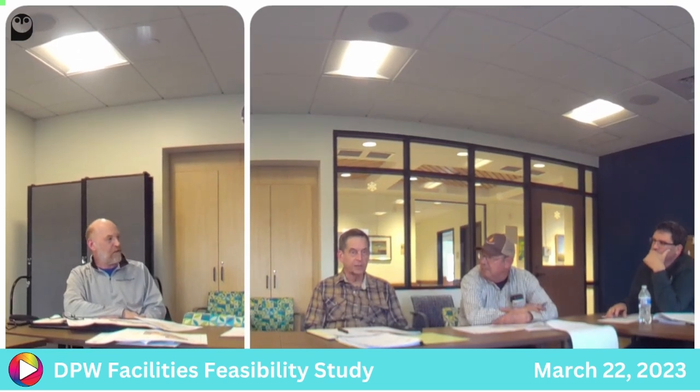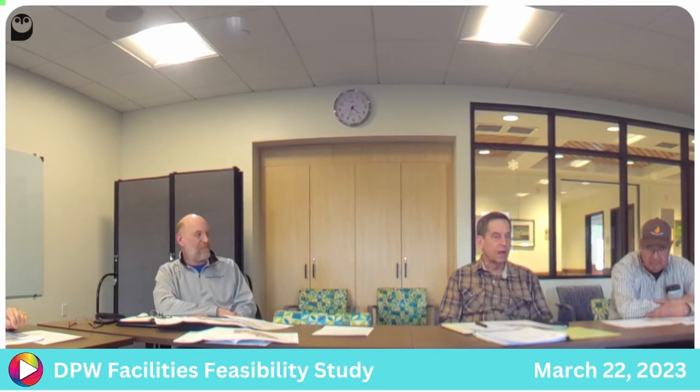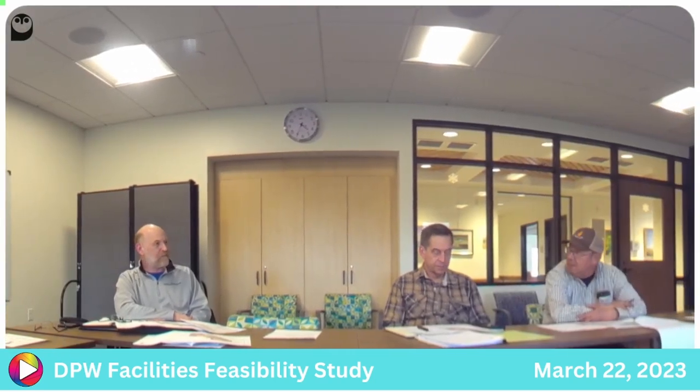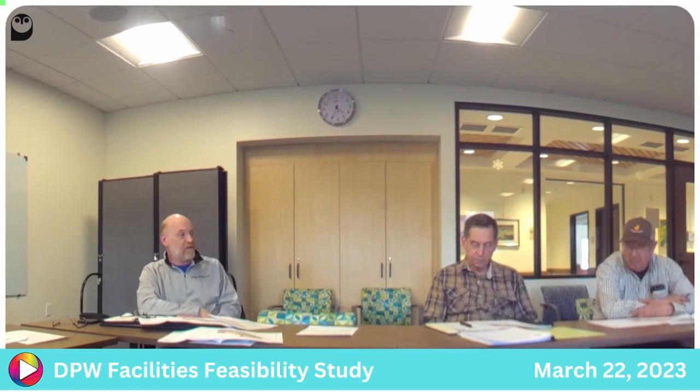Prevailing wage adds about, I want to say, 25 to 30%. I was going to say 30 plus. Yeah, for sure. It's way more than that, Jim. It's more than double. Unfortunately, given that you're a little more isolated out here, that brings up the cost as well, for sure. And then filed sub-bid rules in Massachusetts.